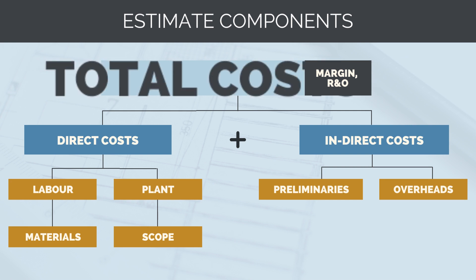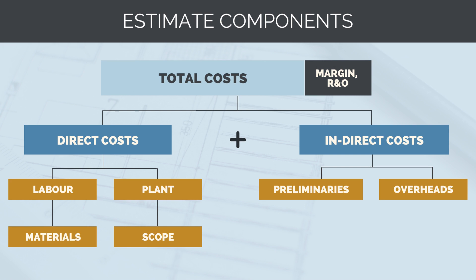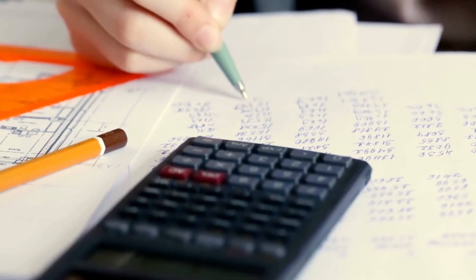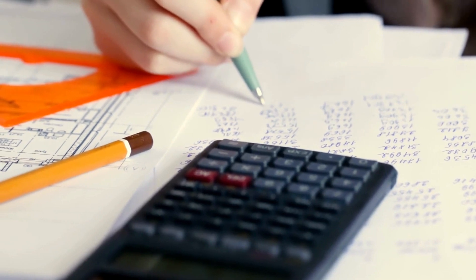Our total project costs are a combination of our direct and indirect costs. To our total project costs, we need to factor in some contingency — referred to as our risk and opportunity — which accounts for any uncertainties in our pricing. And finally, we can then add our profit margin.